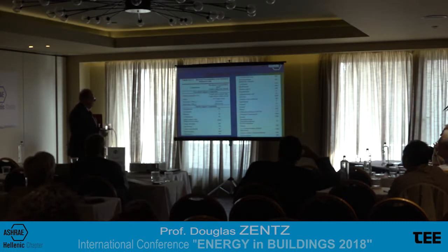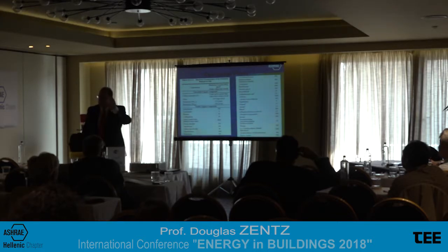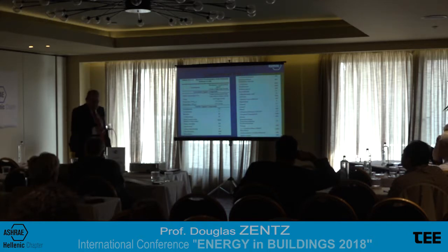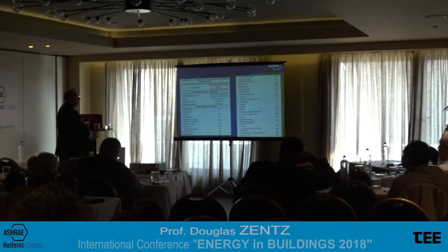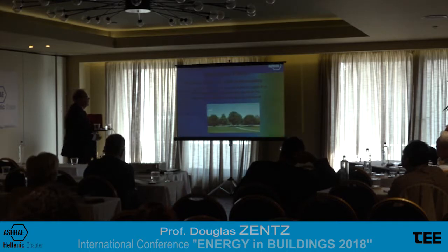I'm almost getting there. Here, this is a table, first time I've ever seen this. We talk about VOCs and new car smell. When you do your commissioning, they want you to do a burnout to burn these things out of the building. If you don't know what that is, basically elevate the temperature of the air, ventilate it for so many hours, and try to get all that out of the building. And these are acceptable limits then for testing afterwards to make sure you're underneath the thresholds.